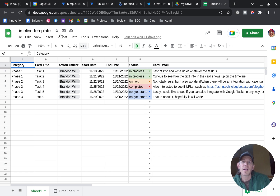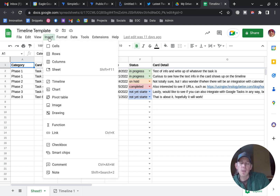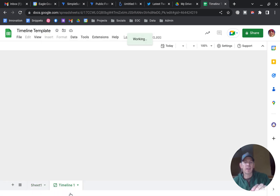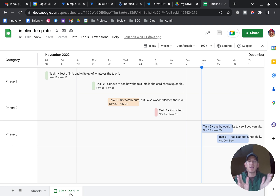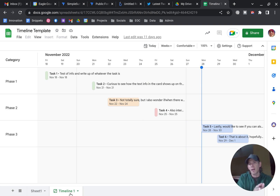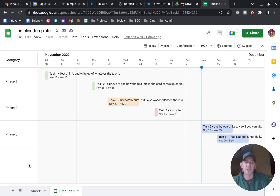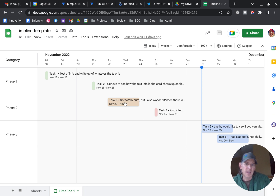Using that data, you can go up to Insert and select Timeline, which I've already done here. If I flip over to the timeline view, it has taken all of that information from Sheet 1 and aligned it on a Gantt chart — you can see where the start date and end dates are, whether it's one day or multi-day.